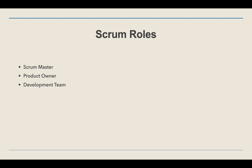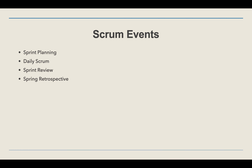The second role is the Product Owner. For each Scrum team there will be only a single Product Owner, who is responsible for all the features. They ensure all requirements are captured properly, all acceptance criteria are updated in user stories or epics, and all tickets are updated and prioritized. They do all the refinement on a regular basis. The third role is the Development Team, which includes all developers, QAs, designers, business analysts, and DevOps teams — everyone responsible for deliverables. They are not categorized separately; all are part of one development team and must complete each task with the definition of done.